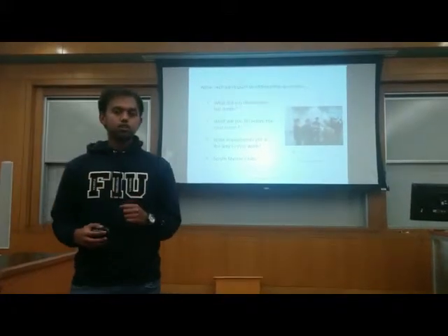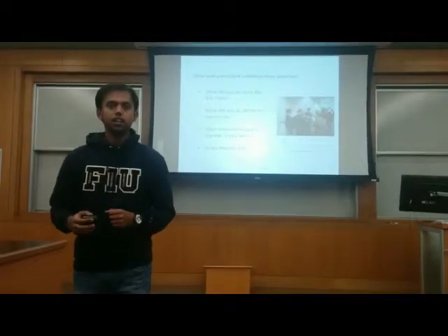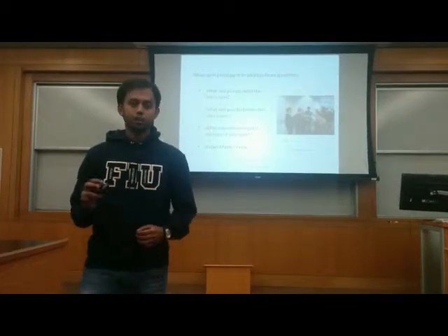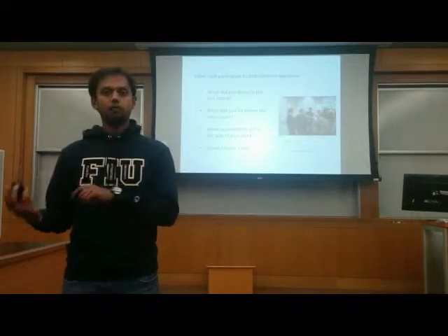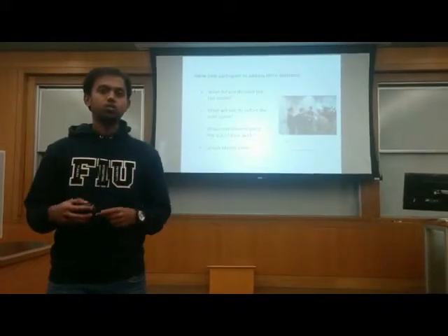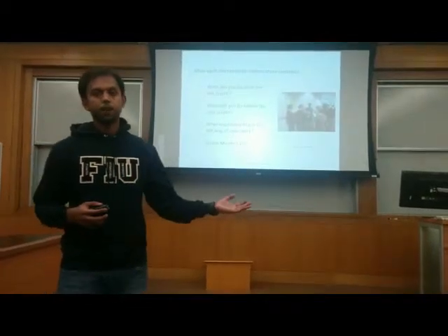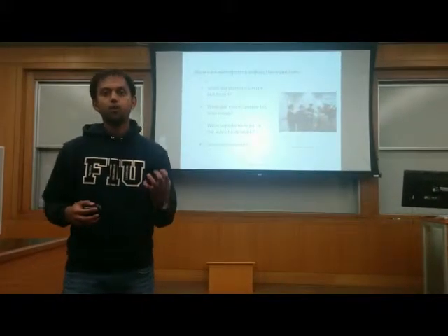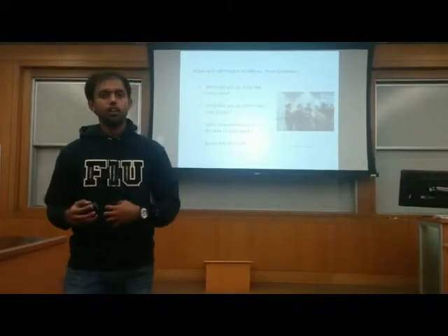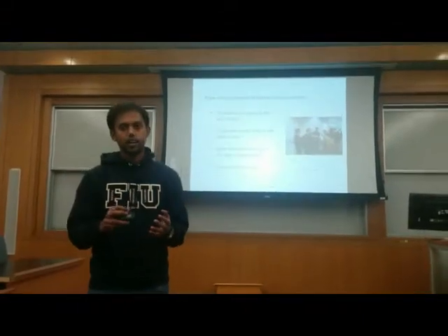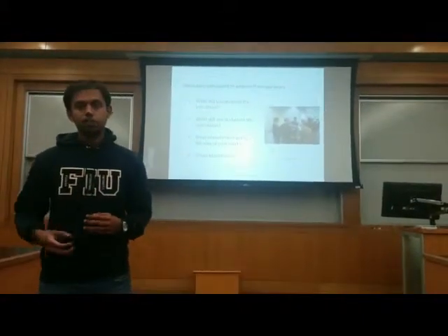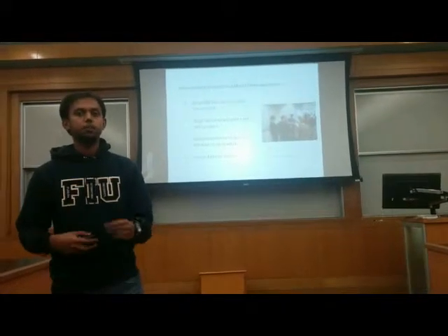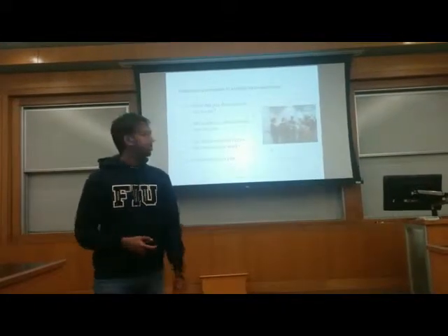The Scrum Master's role here would be, if any team member highlights issues during the meetings, to make a note of the impediments, and after the meeting, go back and solve all the issues as soon as possible. Say for example, a team member says he doesn't have a license to use a particular tool which he needs for his daily work. Then the Scrum Master would make a note of that, and as soon as the meeting is done, he goes back, contacts the vendor, gets the license, and gives it to the team member, so that the team member can go forward with his activities.